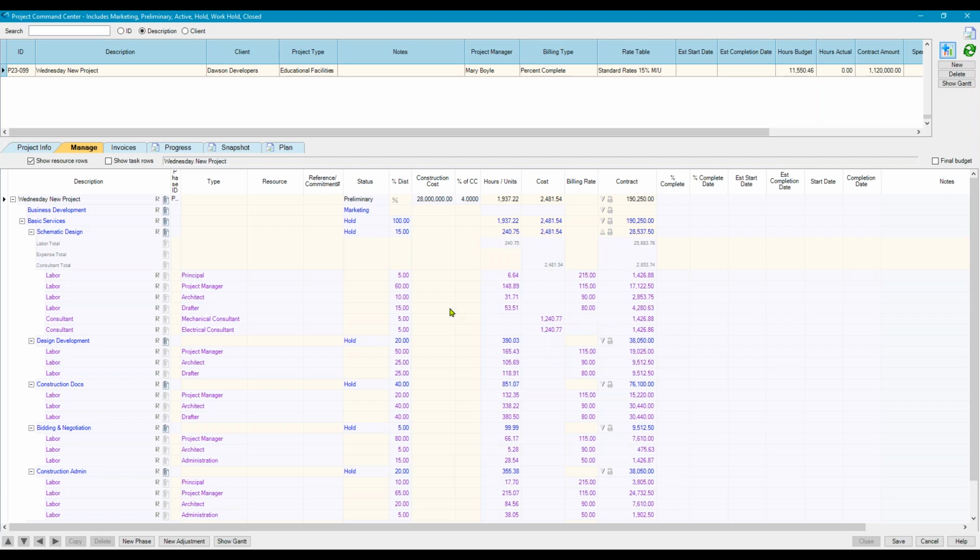Really, our best practice is not to be using percentages for the consultants, because our concern is then our team could potentially bypass going to the consultants and getting the fees so that we have an accurate budget in for the consultants, because we know consultants are painful to everybody, right? And I would have had to manually erase these numbers even though I changed the template. So here I could go back to my 150. There we go.